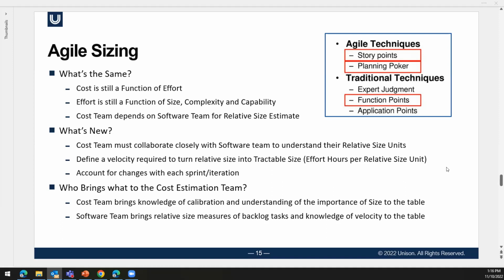So something like function points, understanding that, for this team, in these circumstances on this project, we're not saying that there's a conversion from story points to function points, but within a team, especially one that is approaching steady state with their velocity, it is fair to say that there can be tractable size created from relative size and known velocity.